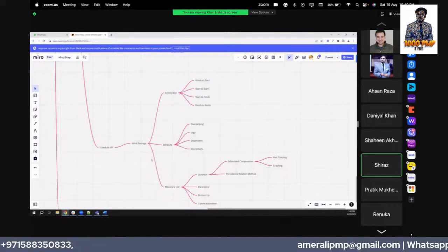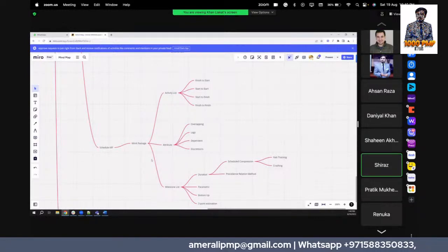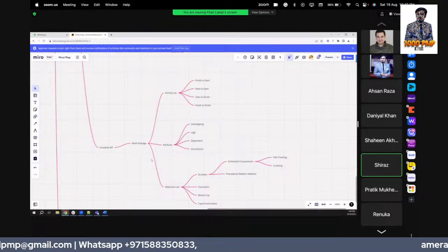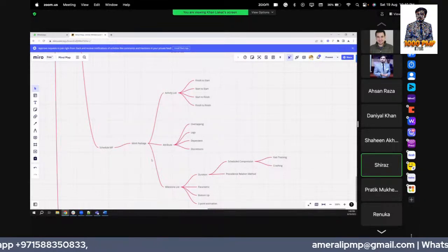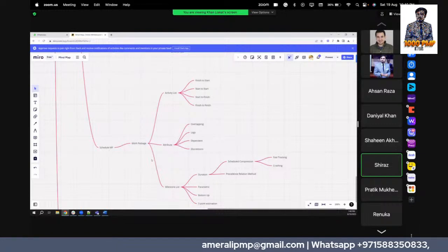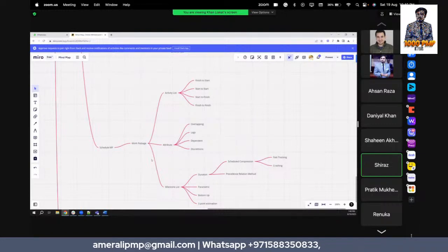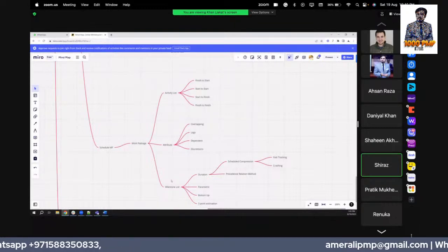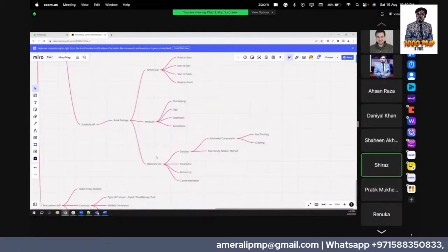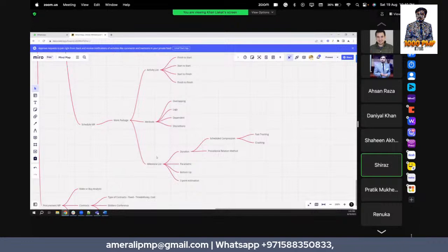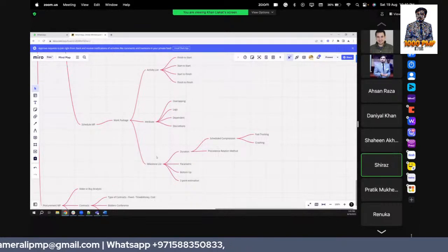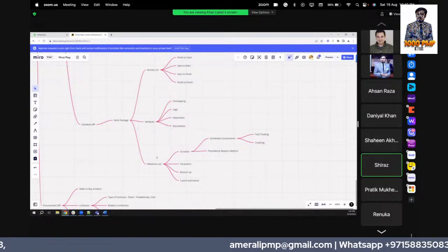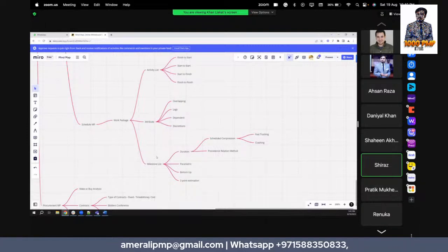Okay, I'll do it. So in the schedule, we already have the WBS. Now we are subdividing it into work packages. We have four types of activity dependencies: finish to start, start to start, start to finish, and finish to finish. Then we have a few attributes here: overlapping, lags, dependencies, and discretion. Then we go further to the milestones, where we set the duration. We have different techniques to estimate the duration: the parametric technique, bottom-up, and three-point estimation. If we want to compress the schedule, then we have fast tracking and crashing of the schedule. So this is about